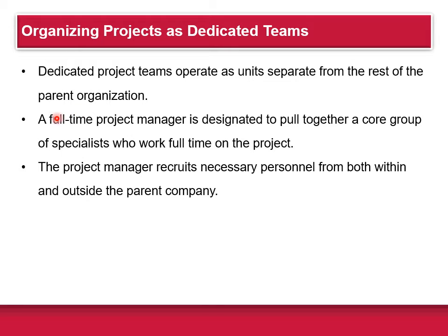So the other end of the spectrum is the creation of dedicated project teams that work on projects. These teams operate as units separate from the parent organization. So they're kind of like their own little company formed to work on the projects. Usually a full-time project manager is designated to pull together a core group of specialists who work full-time on the project. The project manager recruits the personnel he needs, both from within and from outside the parent company. The subsequent team is typically separated from the parent organization and can be given marching orders to complete the project.